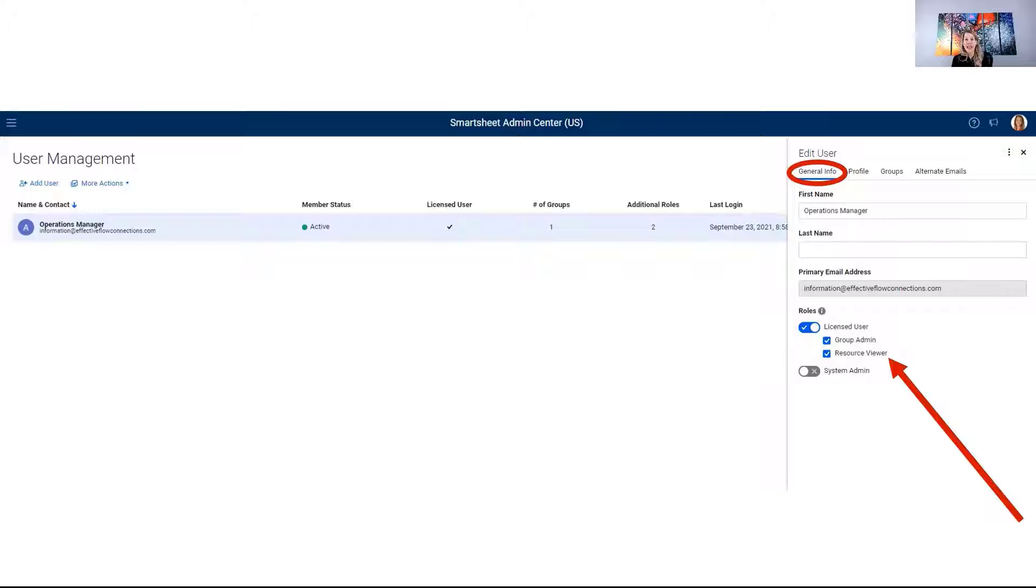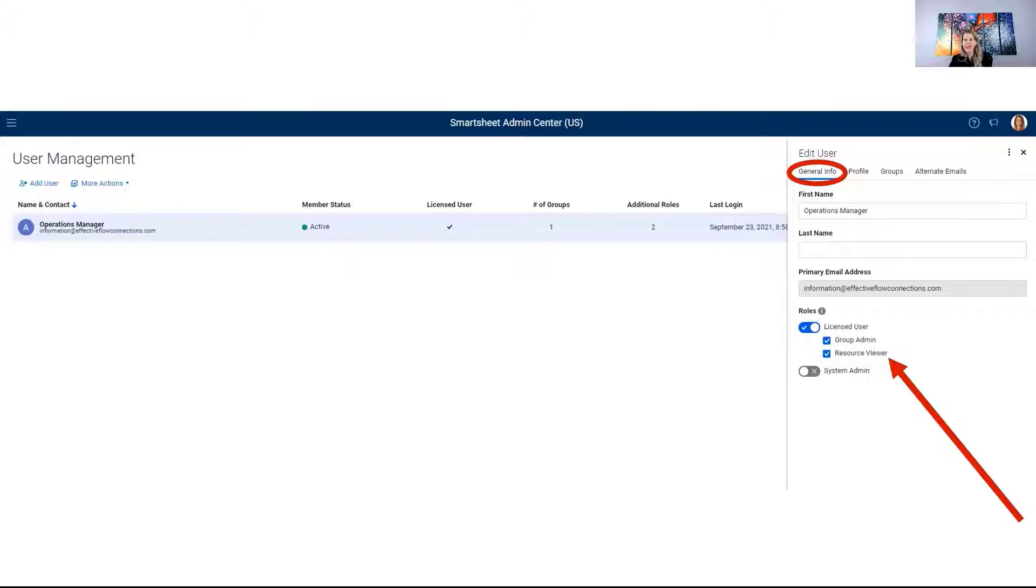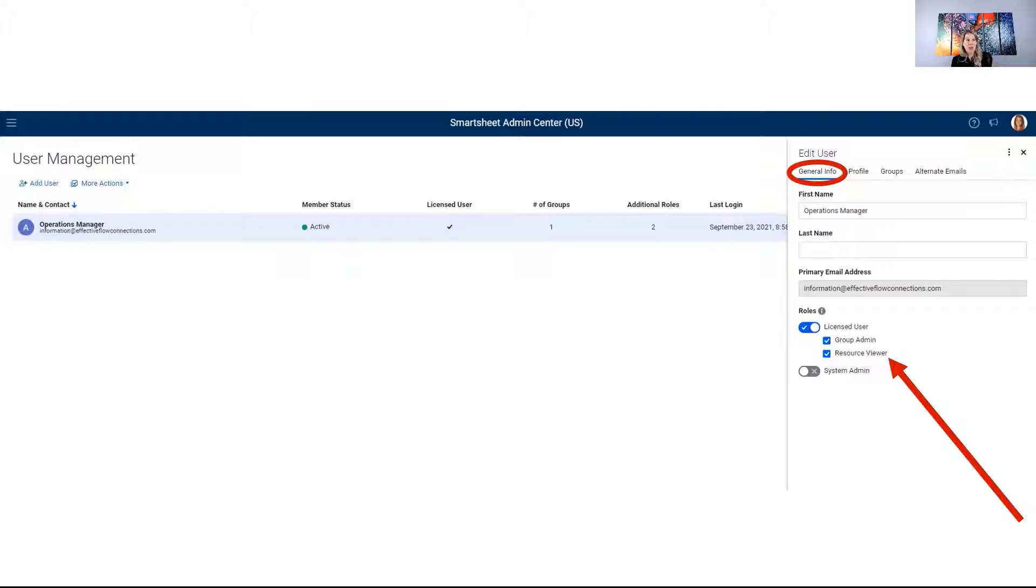And again, we're going to go through how you can set up actual resource allocation within your different projects. You only want to provide resource viewer rights to individuals that you want to be able to see how different team members or users are allocated across various projects. If you don't want people to be able to see this, please don't give them resource viewer rights.